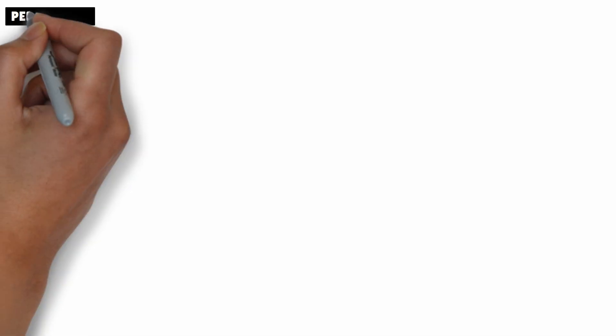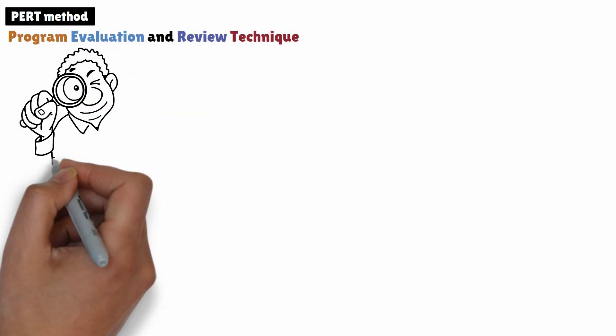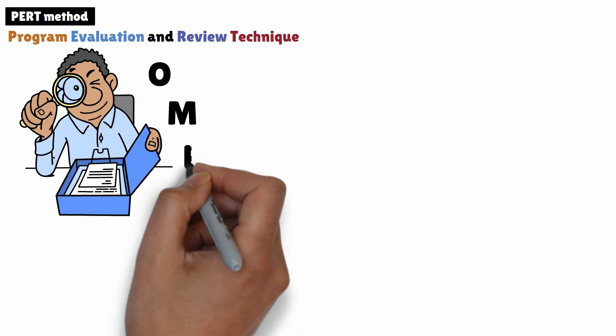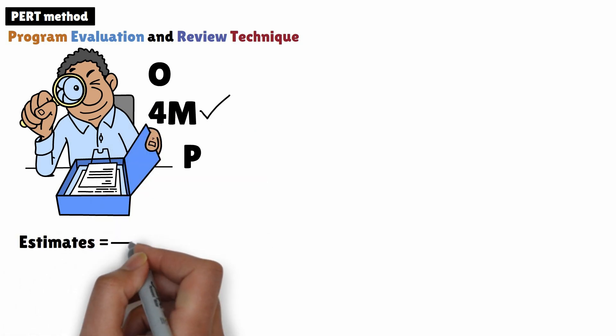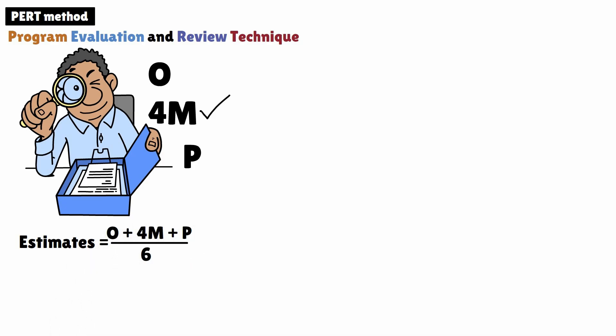Now let's dive into the PERT method. PERT stands for Program Evaluation and Review Technique, and it's a bit more refined. In this method, we recognize that the most likely estimate is usually more reliable and therefore should carry more weight. So instead of giving all three estimates equal weight, the PERT method gives the most likely estimate four times the weight of the other two. In this formula, the most likely estimate has a higher influence on the final result, because it's assumed to be the outcome that will happen most frequently. This approach leads to a more balanced estimate that's closer to what is expected in reality.